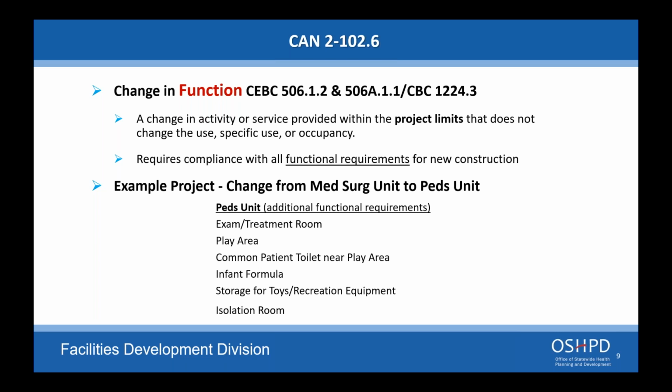I'm going from memory here. We have a Google training or expedited, and you'll see a list. We currently have 4 expedited building permit processes, and they all can be done online now. Most of them, actually all of them, have to do with skilled nursing facilities: water heater, handrail. What's the latest one? HVAC replacement. So those are your expedited building permits. There's one more. Oh, TV mount. We are working on some more for re-roof for a skilled nursing facility, as well as generator replacements.